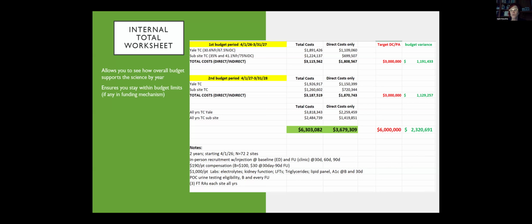So if that rate goes up and your university says, you have to give that person now instead of 228, you have to give them 230. That's two more thousand for each person. You can't go back to them and say, I need two more thousand for each. They're going to say, I'm not giving you any more money. So what happens is that their effort drops, to meet that number, because you have to meet that number.